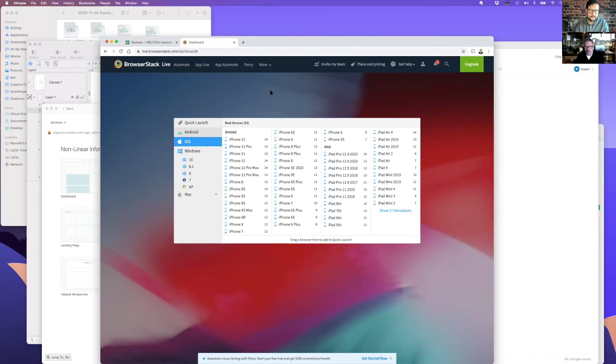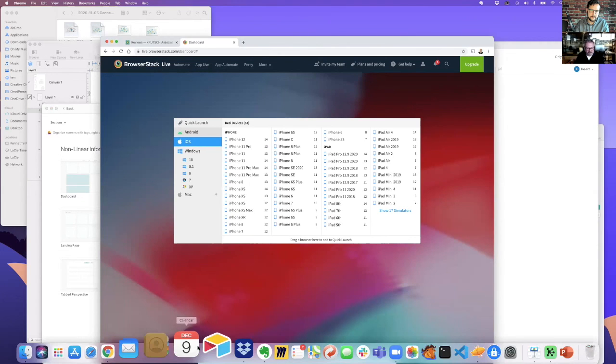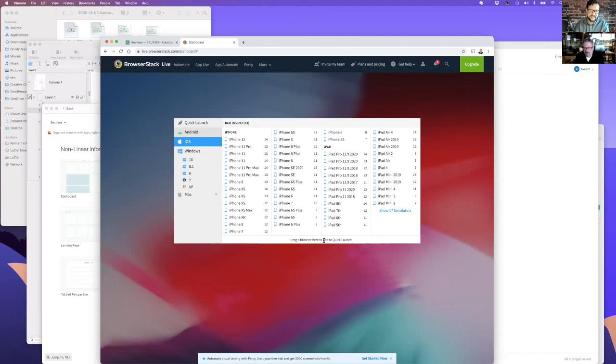And another tool that we're really big into using too, I don't want to share this screen because I've got a lot of sensitive client stuff in there, but we use Airtable, if you're familiar with that, to do a lot of our planning. Airtable is kind of half database, half spreadsheet. And we use that to do the equivalent of sprint planning, right? For putting our milestones together and for tracking what's done and for tracking defects, requirement changes, whatnot, and all that.